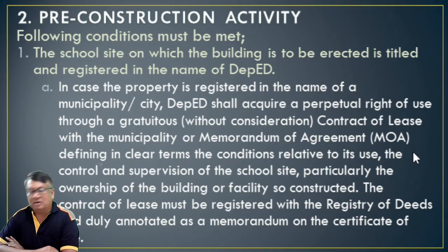So, that is one of the requirements: before the construction will be done, there should be compliance of presenting the legal title in the name of DepEd. Land title in the name of DepEd.